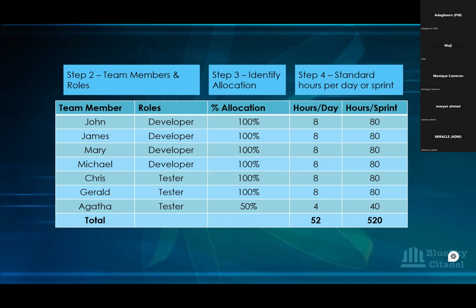The developer does the coding to build it, and then the testers test and validate what has been done, to validate that what is in the acceptance criteria is what the developers have developed. So the people that you are getting the capacity for are the developers and the testers, not the BA, not you, the Scrum Master, because you guide the team in the process, but you don't actually develop.